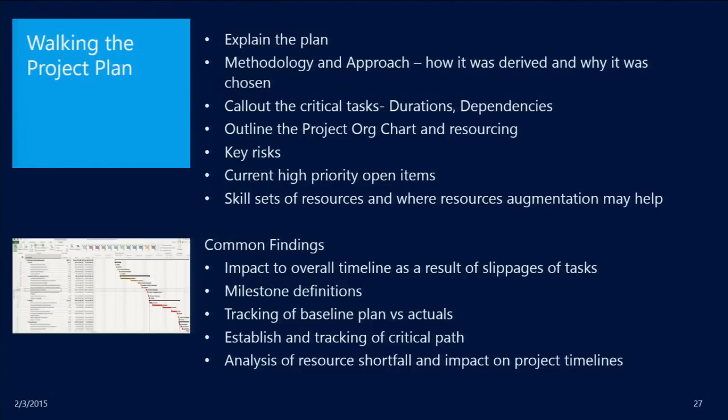In terms of walking the project plan, this also ties into our project review agenda. It's important to really spend some time on the project plan itself. I'll talk about some of the common findings that I typically come up against. The impact of the overall plan and timeline as a result of slippages and tasks is not necessarily tracked. I don't necessarily always see milestone definitions within the project plan, which causes me a bit of a problem.